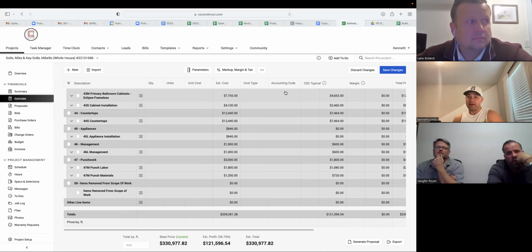But we tell them it is our SOP that if they say no, they don't want to raise their budget and they don't want to trim their scope, and those are the two options they have to meet it, then we give them their design money back, 100%. That's just SOP. But you do that in the first week, so that way you're closer.